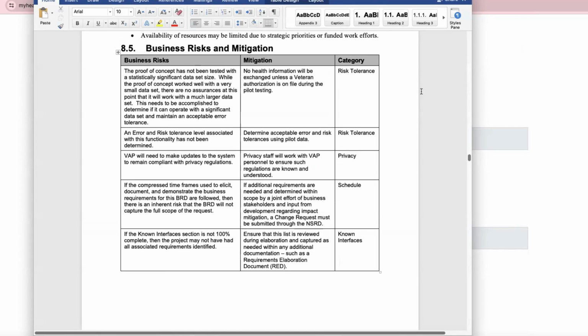Okay, so once you get the approval for the BRD, and also for the user acceptance testing document, and once we near the end, there will be a go or no go call. That's a final call you're going to have with the business owners, and you're asking them, can we go live this weekend? And they say, okay, everything is fine, and even the risk, we are fine. And they're going to say, okay, we can go. Once you get that permission, only then we can deploy the code to production, and there'll be an actual go live happening. Usually it will be in the weekends only, like maybe Friday night or Saturday morning.